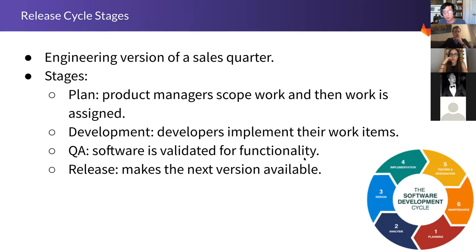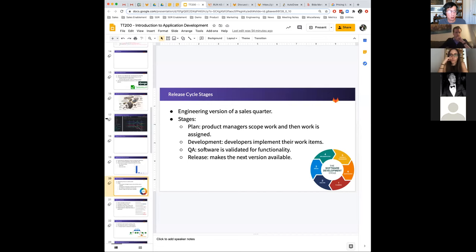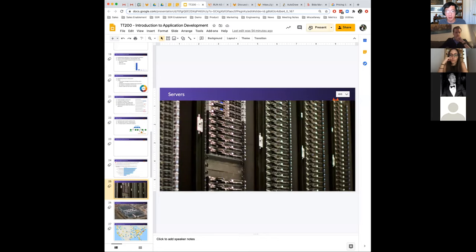I was a test engineer, validating software for functionality. What happened all the time: developers were always late, but the project deadline would never get pushed back because managers didn't want to look bad. That meant the test team got crunched — instead of having a month to validate everything, they'd only have two weeks. Everyone had to work late, everyone was stressed. This happened about two-thirds of the time. GitLab can help people not work late at night and help managers systematically deliver better products through the power of automation.